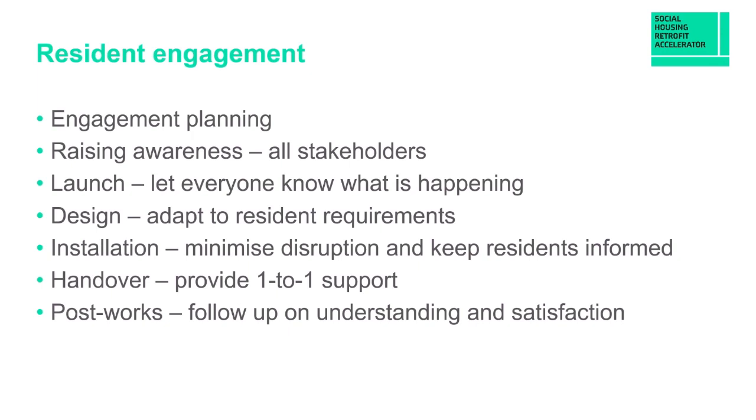And when it comes to the installation, your goal is to minimize disruption and keep residents informed what's going on. Are there any delays? Are components stuck on a boat somewhere waiting to be imported? Is there a shortage of manpower to complete some of the work? Have some problems emerged? If there are, get on the front foot. Tell them about them. Don't let rumors spread through the community.